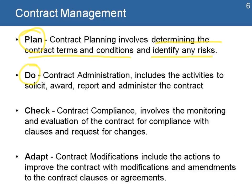The next step, contract administration, includes activities to solicit, award, report, and administer the contract — either the contract with the donor or contracts with third parties. The check step involves contract compliance: monitoring and evaluating the contract for compliance with clauses and requests for changes. And the adapt step covers contract modifications that include actions to improve the contract, with modifications and amendments to the contract clauses and agreements.